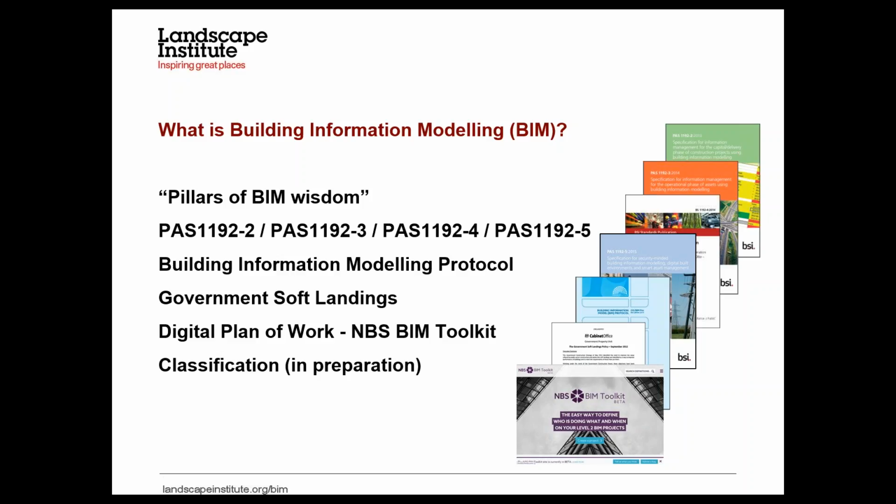Maintenance person, you're maintaining the project. You have a process of handover where the designer and the facilities manager work together to make sure the systems are in place and overlap quite nicely. So there's a subtle transition, a soft transition between the construction phase and the maintenance phase, where you can iron out information and ensure that what you want to deliver as a design intent gets delivered from the maintenance